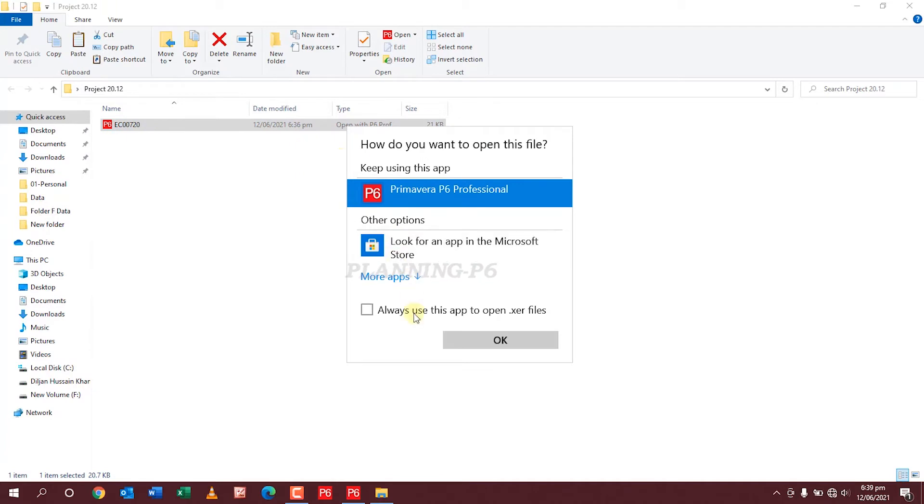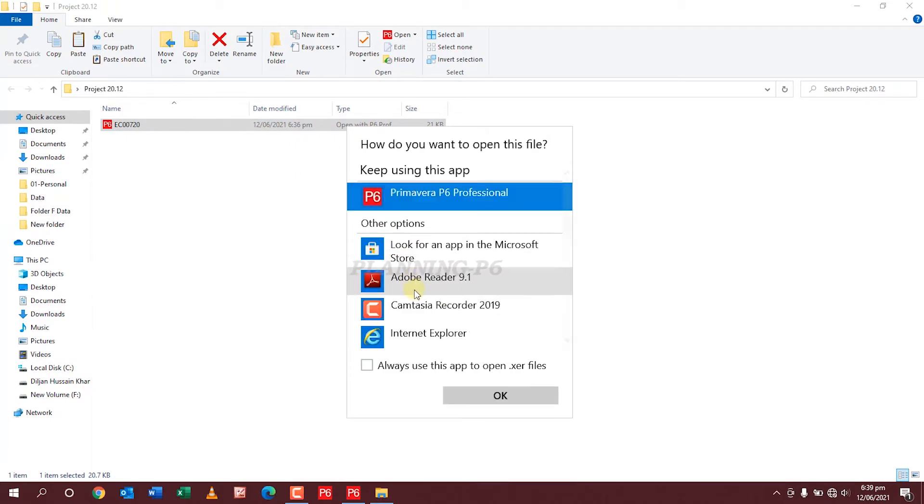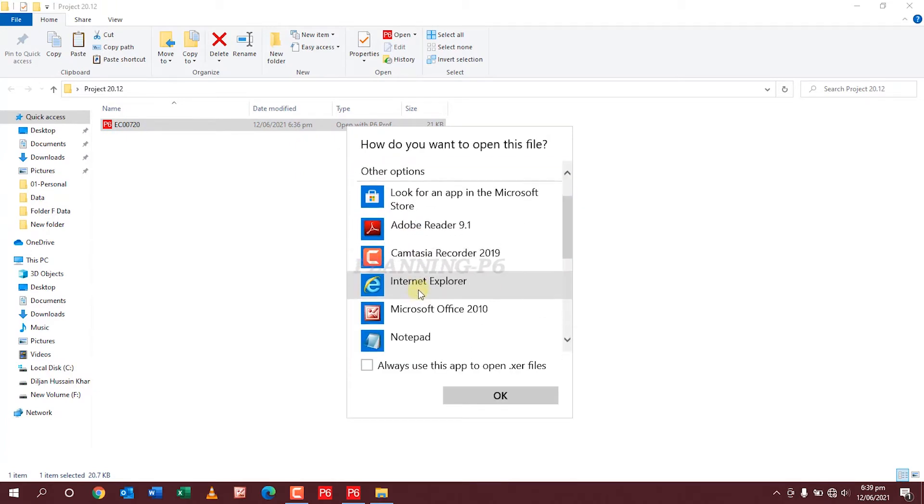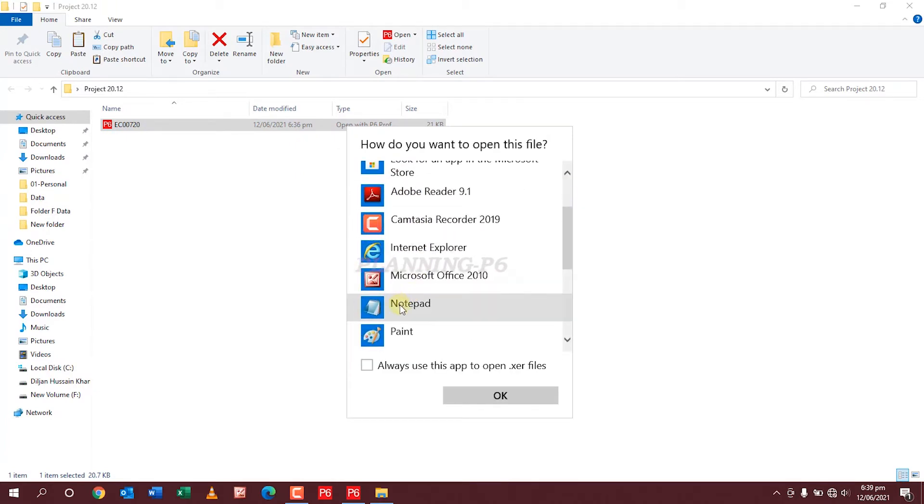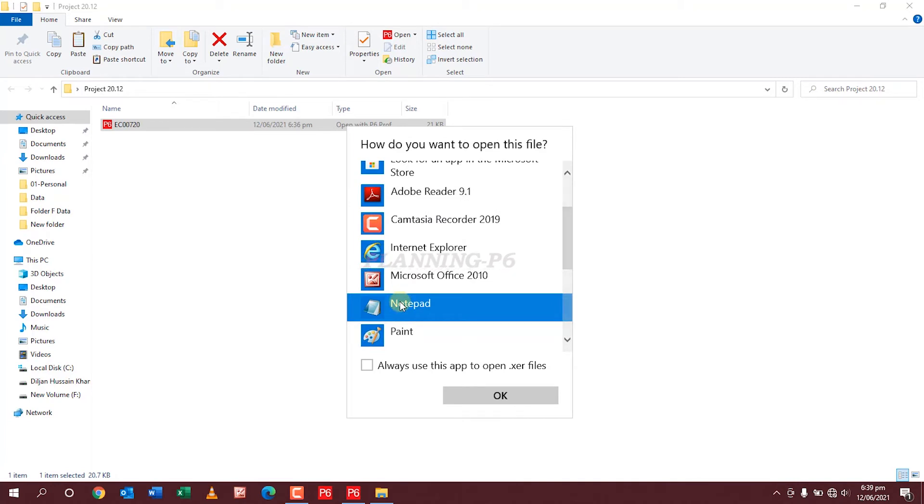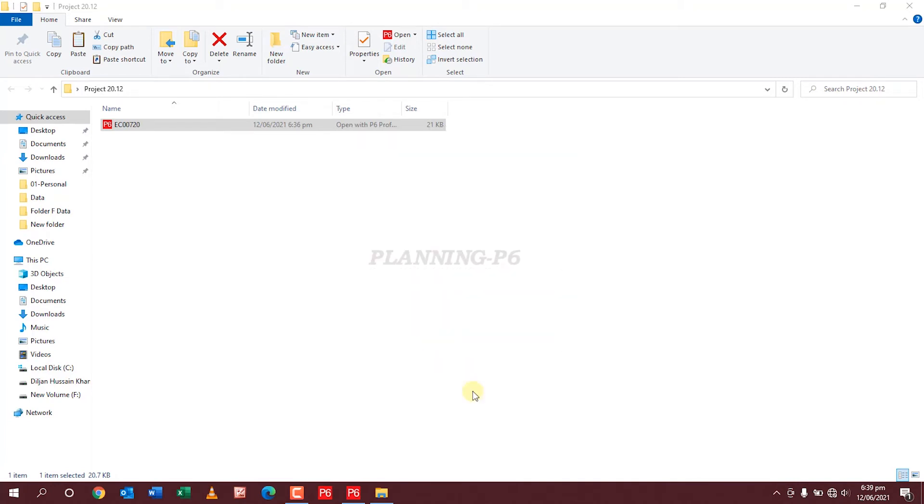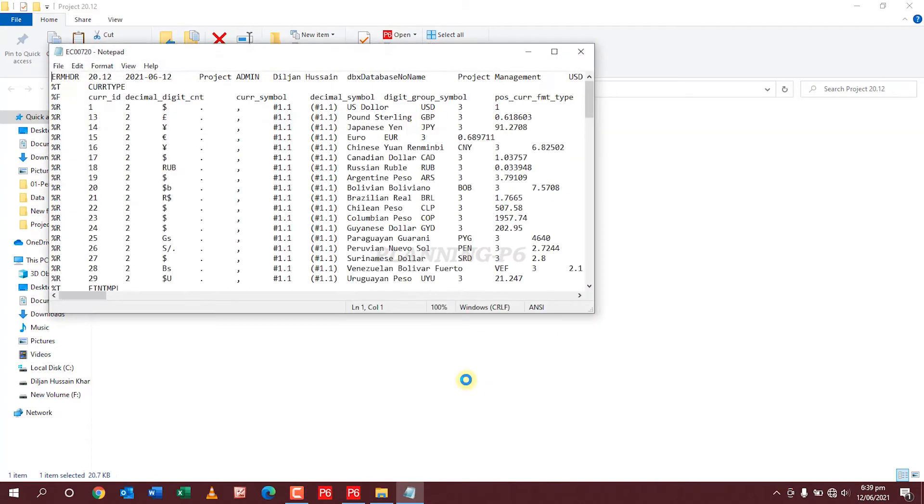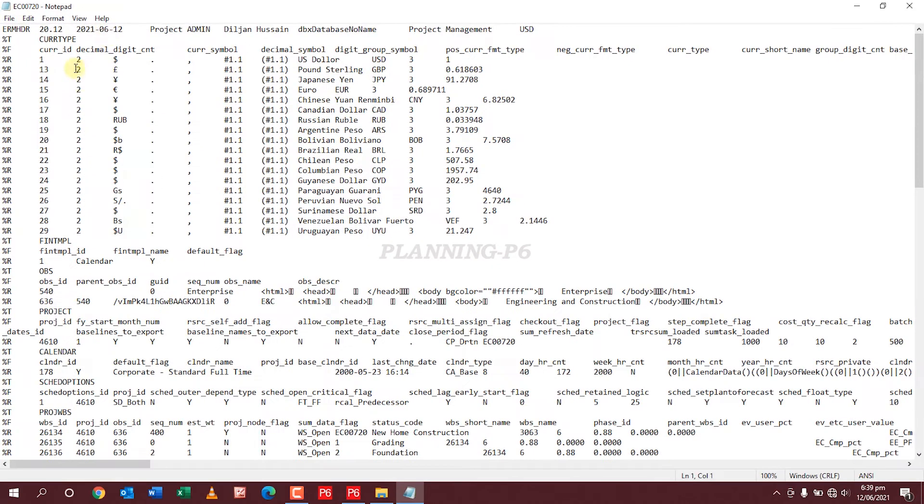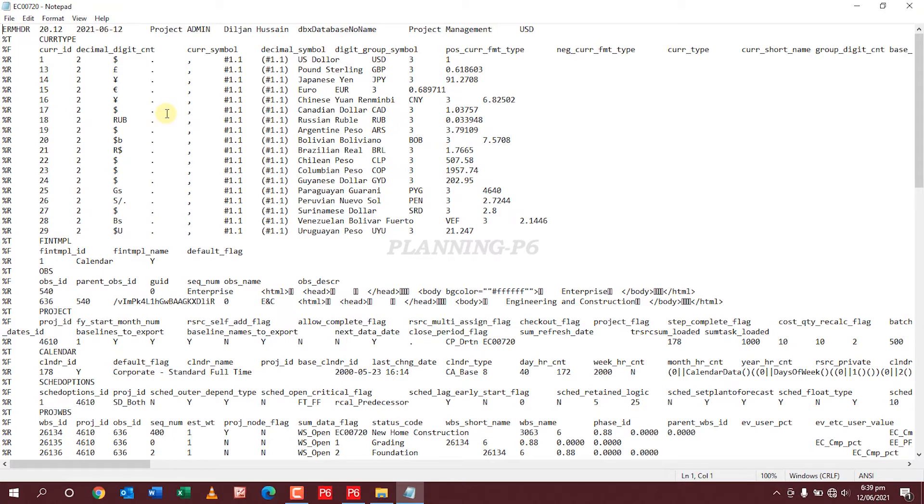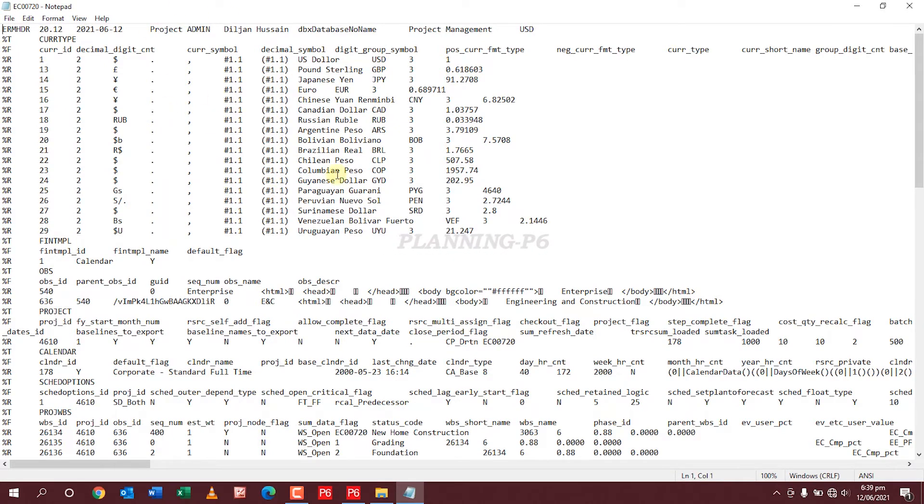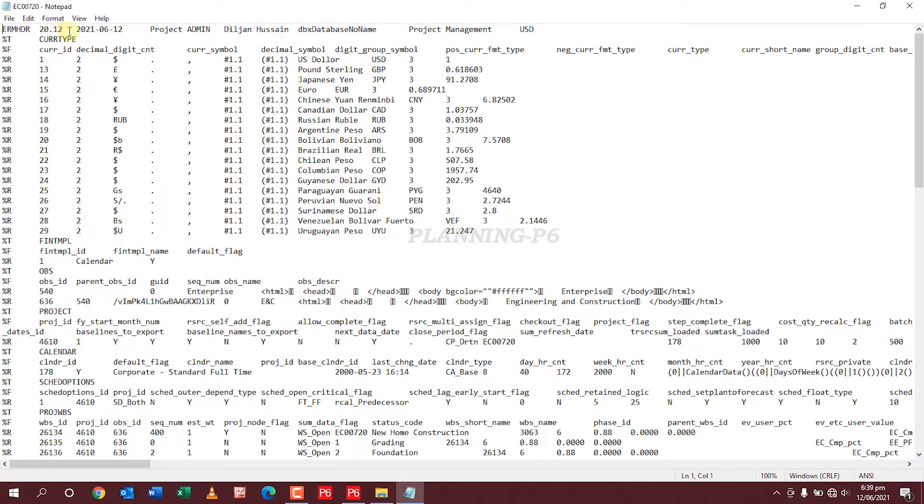Select notepad, more apps. I want notepad. Don't check always. When this file is open, you can see here in the notepad. The XER file will open as a text document like this one. On the top left you can see the version of your file.